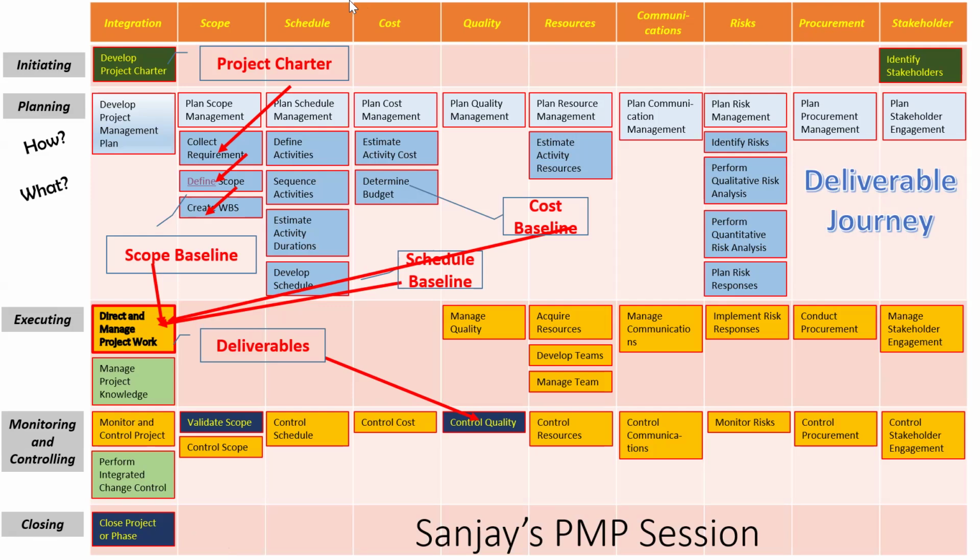The testing team, the team itself. That's very important. Are you getting this point? So once they validate it, it creates a verified deliverable. Did you notice the deliverable now became a verified deliverable? This verified deliverable is then offered to Validate Scope, which is the customer's acceptance.